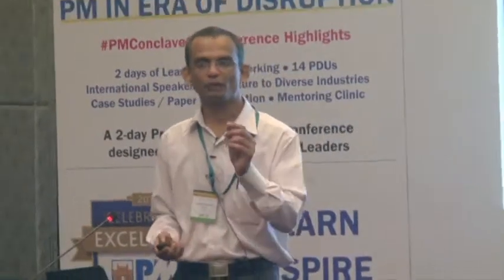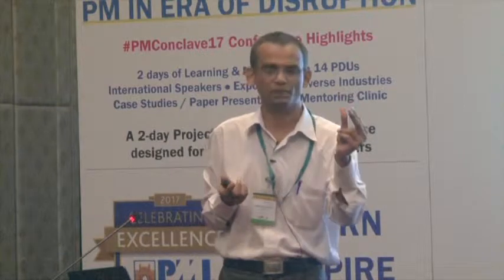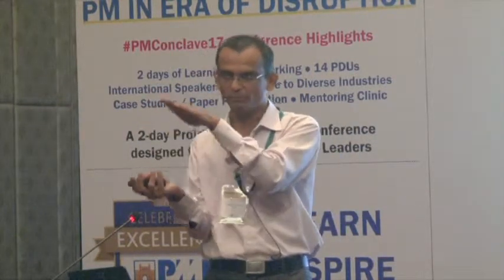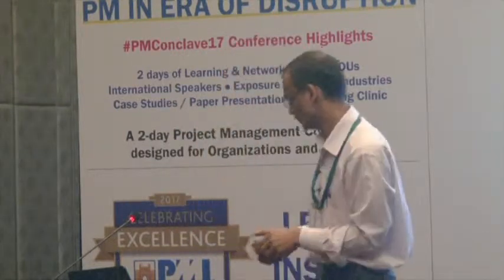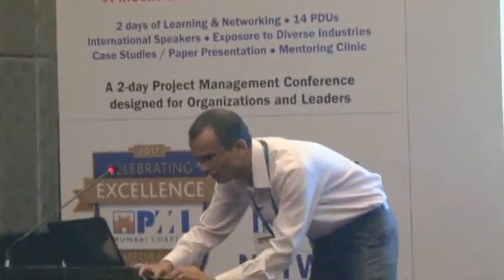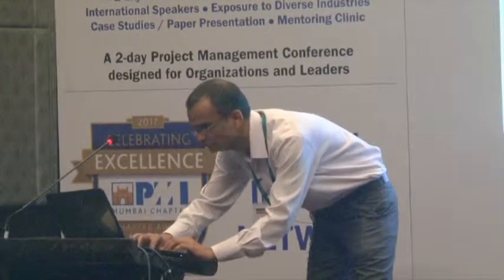Right. So, sir, what happened? The input comes in the form of optimistic, most likely, and pessimistic scenarios. Now, this beta distribution requires two more parameters, called alpha and beta. They are like intermediate variables. So from optimistic, most likely, and pessimistic, we convert into alpha and beta. Let me display this formula.